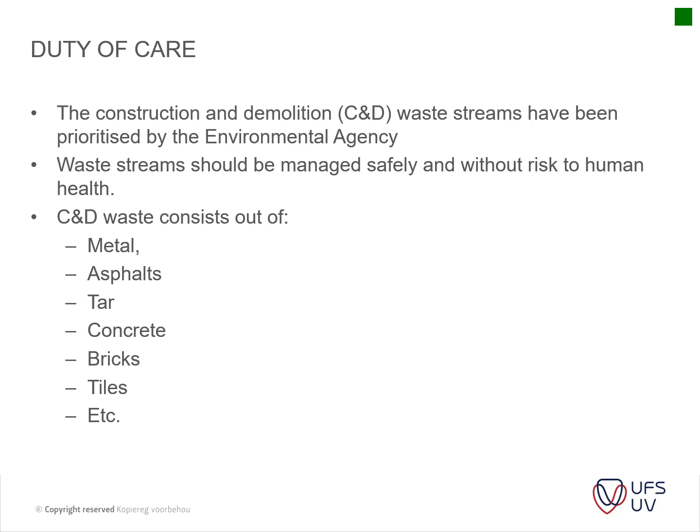Okay, and then the waste may consist of metals, asphalt, tar, concrete, brick, tiles, etc. And there's actually money to be made out of some of these demolitions. Sometimes you can sell your hardcore, or some of your demolition material you can use for fill in other areas.